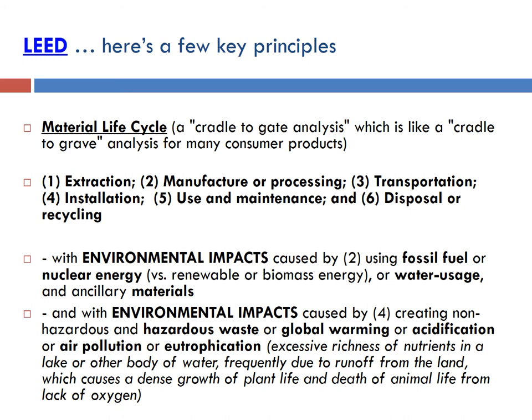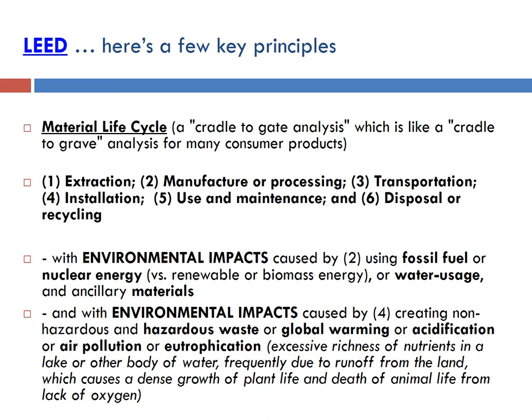You want to think of impacts and mitigation. If you're proposing something — whether you're working for a planning commission, or you're a developer, architect, engineer, or consultant — think of the impacts. There's always going to be some impact, but you do some mitigating measures and overall you have a net gain and it will be allowed to be built. If you can bring everybody in ahead of time in a charrette, that is a great idea and you get points for that in LEED. Developers historically would get investors and the architect in for some concepts, but it's better to bring in engineers, customers, the community, and contractors early. You get a much better design that's better for the community as well as better engineering and architecture.